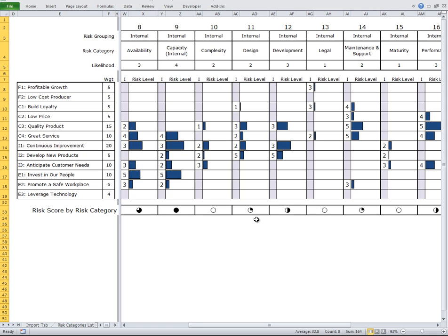Where there's a half and a quarter, you may determine where your personal threshold or your organization's threshold is, but the net is these may not necessarily be covered in the first pass of putting together your risk register. So thing one to look at is where the highest risk by category exists, to make sure that's covered off.